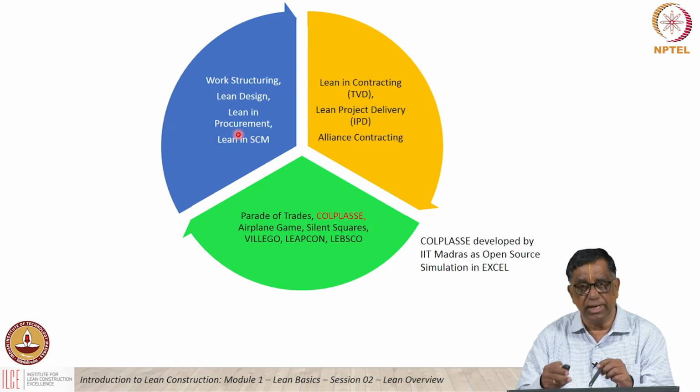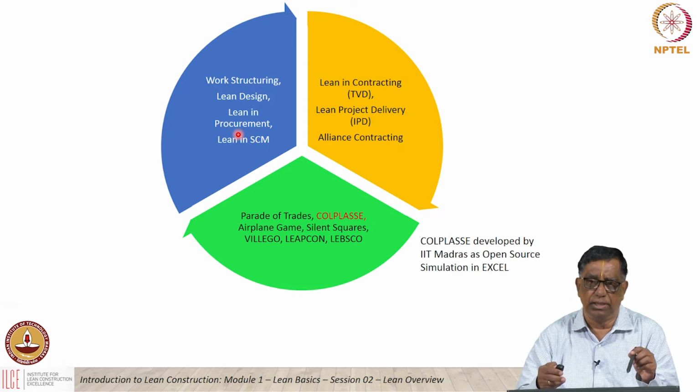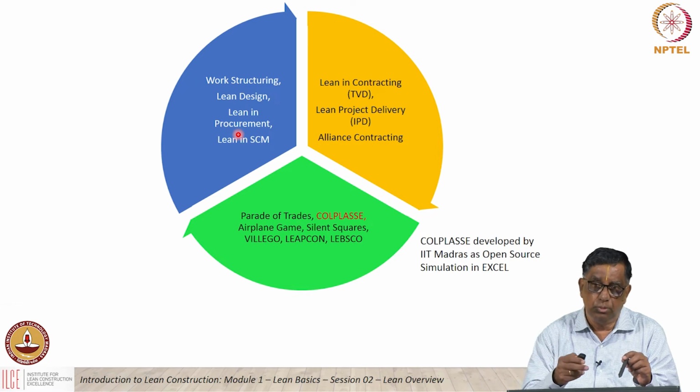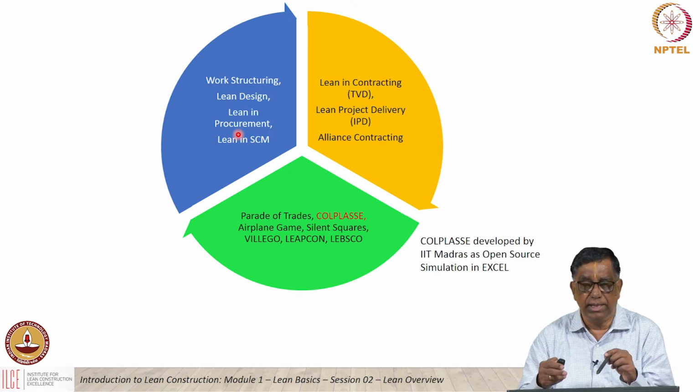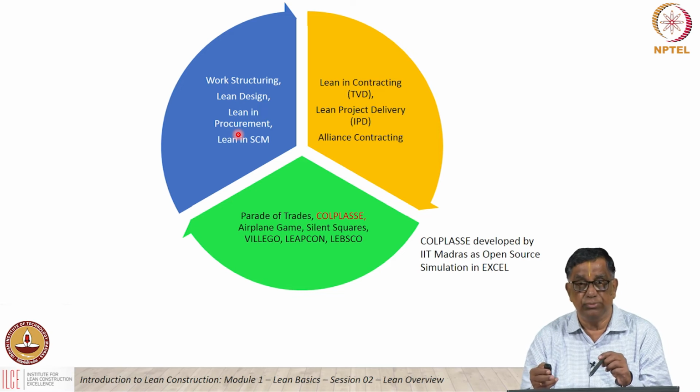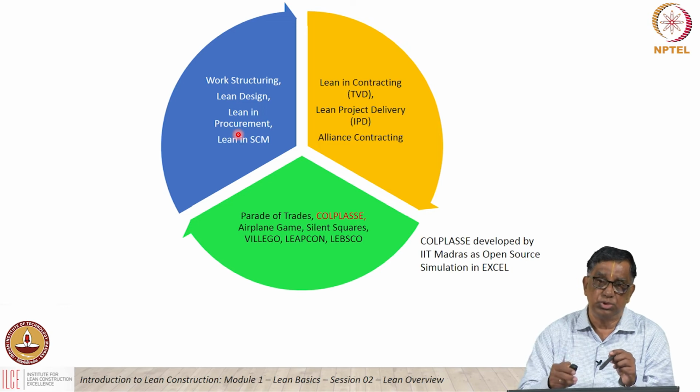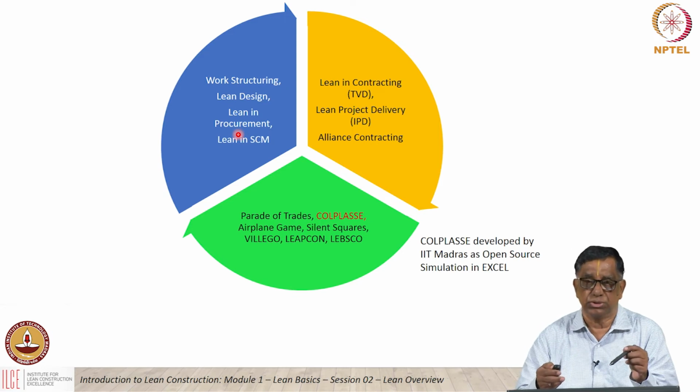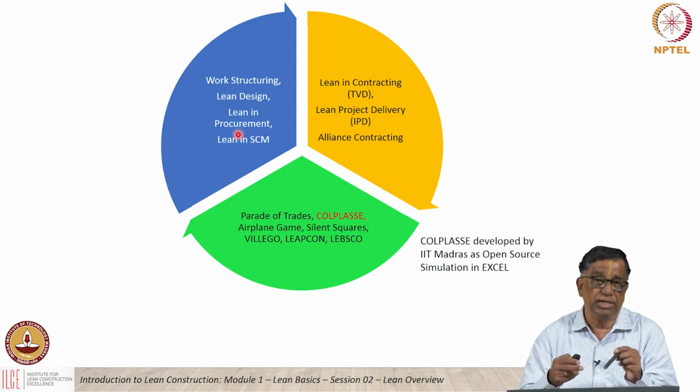Then when you have the contracting model, the conventional model which we have right now is very inefficient, is based on distrust. There is no commonality between the approach of the client and that of the contractor. So, target value, for example, many times when you have a particular budget in mind, the owner develops the complete design and the model, looks at the cost after going for contracting, and then decides, oh, I can't afford this. Then he does some chopping and curtailing something on an ad hoc basis. Then the functionality gets lost. You may come to your cost, but the functionality may get impacted.